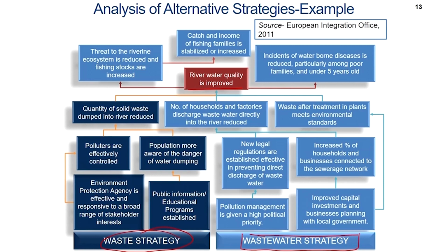So, the flow of thought, we flowed very logically with respect to the problem that we are studying here. We begin with the stakeholder analysis matrix, then into problem analysis, then we go into the objective analysis and then come up with strategies analysis. So, this is the analysis phase of the logical framework approach for project design. Now, let us look at the planning phase, and the planning phase is where the logical framework matrix or the log frame matrix is usually used, where we start thinking in terms of measurable outcomes. In the first part, the analysis phase, we are trying to understand the problems and the different strategies that we can take up to address the problems that we have identified. But in the next stage, we start thinking in terms of what are the measurable outcomes.